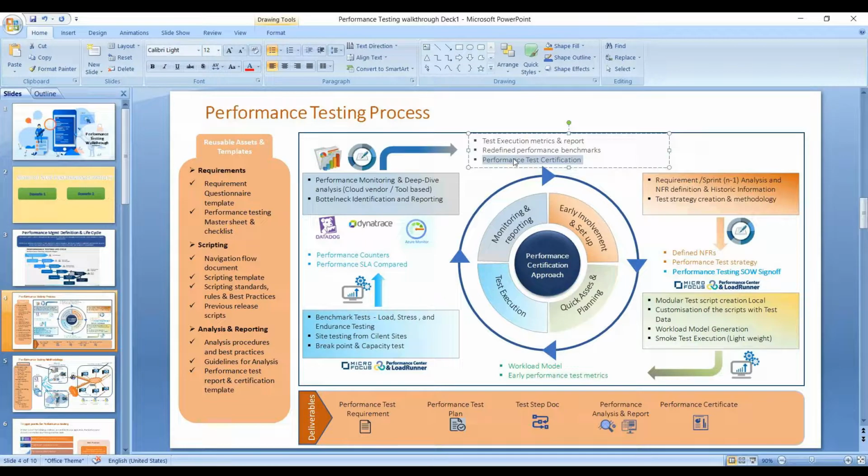The reason is that sometimes in future the user base increases or some parameter gets changed, and then performance degradation will happen. The customer will come and say you certified that the application would be stable with this user base, and now I'm having performance degradation. At that time you tell them, sir, this is what I certified, compare it and see whether any changes have been made. If it's the exact same build, on a software and infrastructure level, then the issue usually doesn't happen; they must have made some changes. Or you can tell them, you have made these changes, and I have not certified on this.